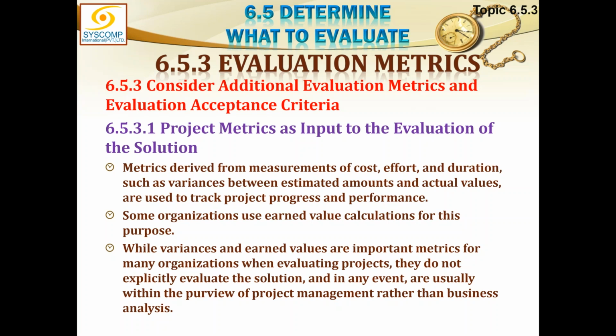Some organizations use earned value calculations for this purpose. While variances and earned values are important metrics for many organizations when evaluating projects, they do not explicitly evaluate the solution. So these are not applicable tools for evaluating the solution, and in any event are usually within the purview of project management rather than business analysis. So such tools may not apply when we are taking data input from project metrics.